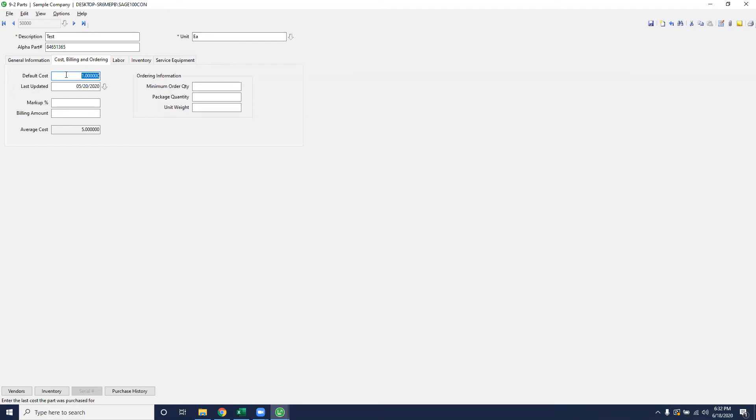If you don't know, you can definitely just leave it blank or put in one dollar and update it on the grids later. You also have the option to put on a markup percent so that it bills the customer a specific dollar amount that's above the cost price.